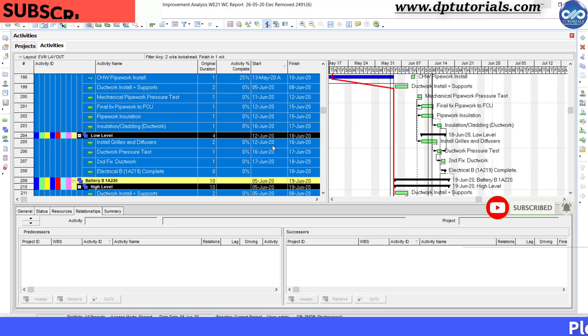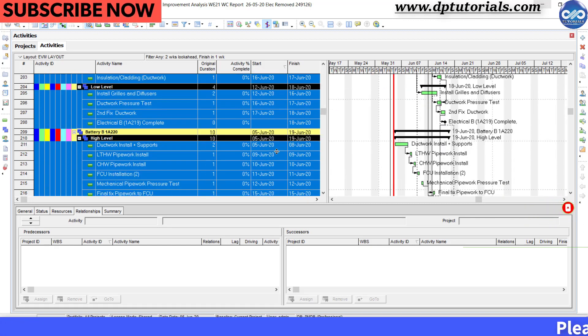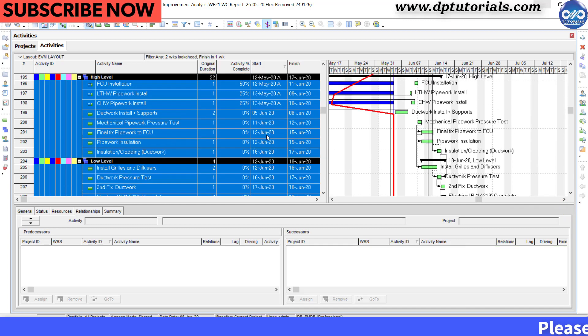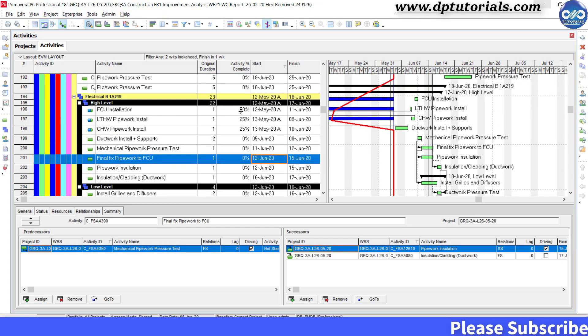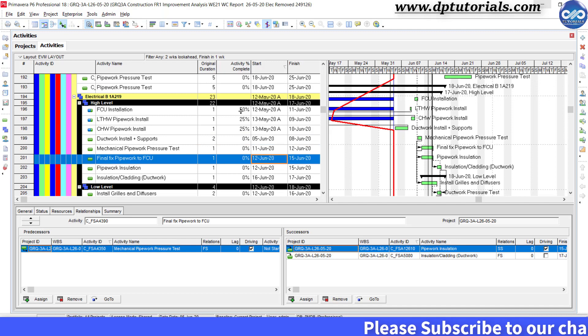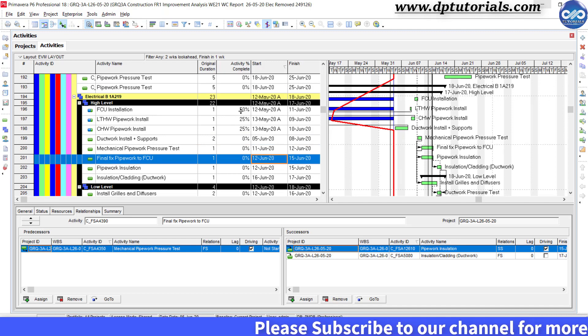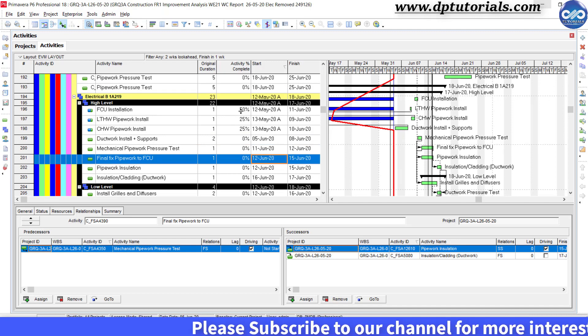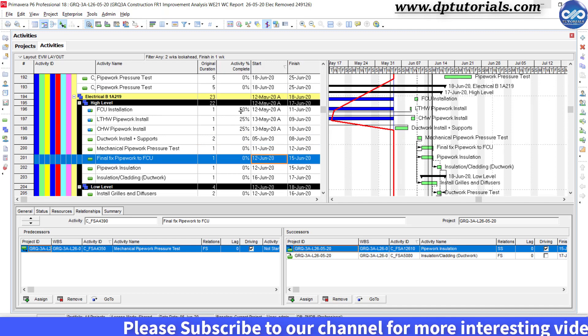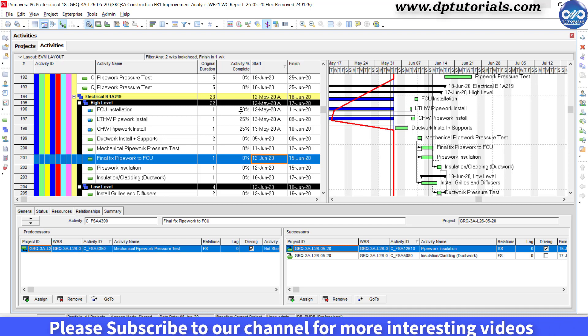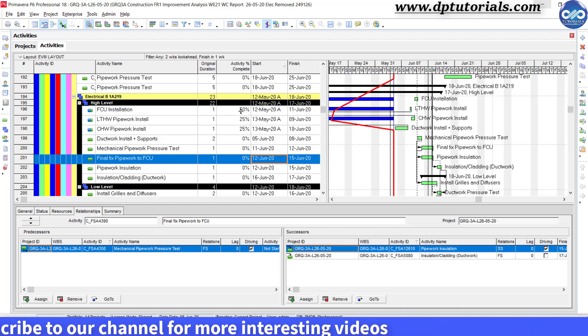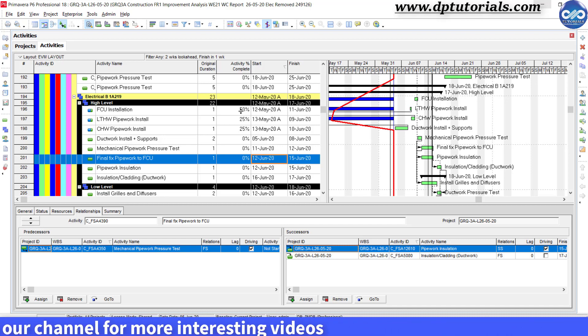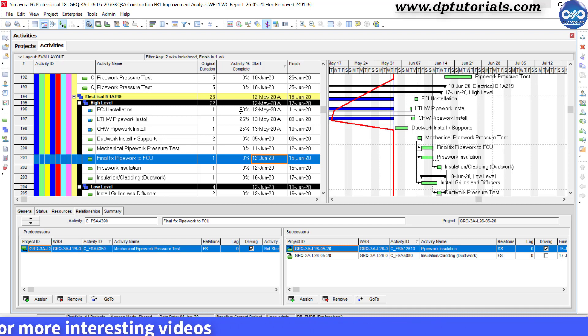So the solution is that we will be modifying the bars so as to color code those activities finishing in one week. To do so, we need to create one more filter called as finish not in one week.